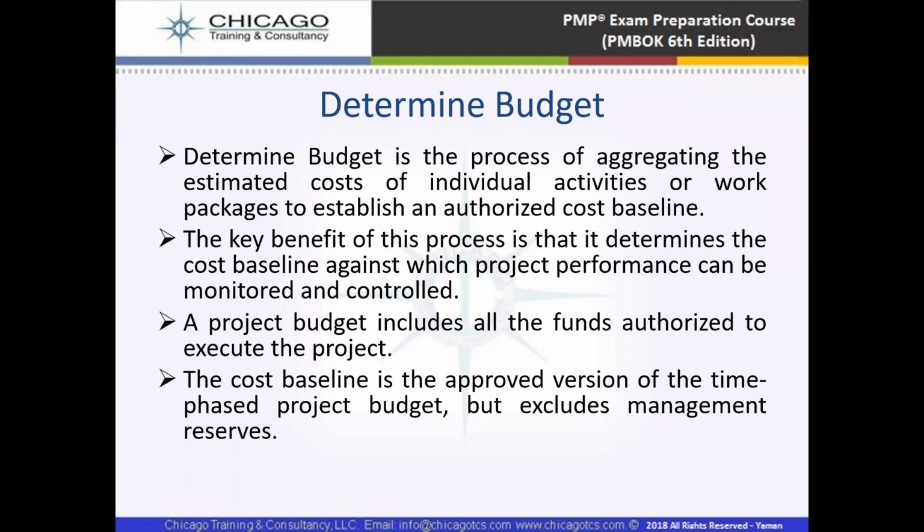Because in the schedule, it will show us that at that particular month in the project, the budget will be that much. This will be the value, maybe 5 million, 10 million, 15 million, 3 million of budget allocated to this particular month, and it will be based on the cost baseline. And the cost baseline is referred to the scope and to the schedule baseline.